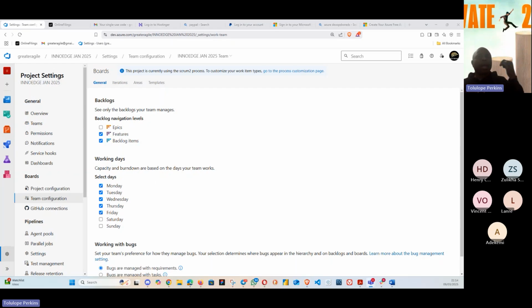Then under that epic portfolio, we have what we call capability. Capability is what we are going to do in the next one year. Then under the capability, we now have epic. Then under the epic, we now have story and then task.